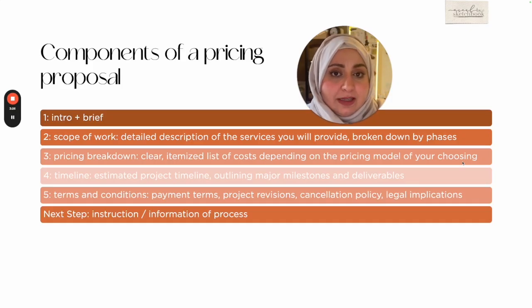How you divide this might be confusing, but it's really up to you. Do you want to have things like 50-50? That's also a possibility, but I like to make it easier for the client to make a payment, so I will always divide them like 50-30, then 20. So at the end I'm getting 20% of the entire project, but I'm pretty content with that.